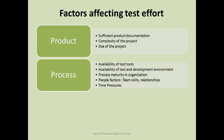People factors are another consideration. For example, if no automation skills are available in the team and you want to do automation, it will require more effort because the team needs training before they can start. If the team already has good automation skills, they can start immediately and save the time spent on training and ramping up. Other people factors include the relationships within the team.